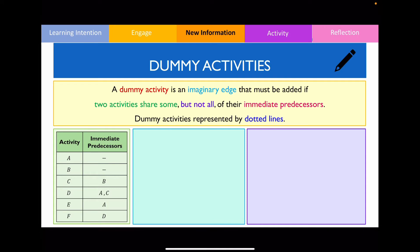To understand what a dummy activity looks like and why it's used, let's try to draw the activity network for this particular precedence table. Looking at the table, we can see that we start with activities A and B because they have no immediate predecessors. So I'm going to draw a starting vertex and draw two edges branching away from it labelled A and B.